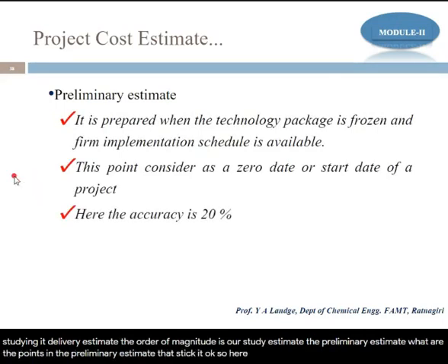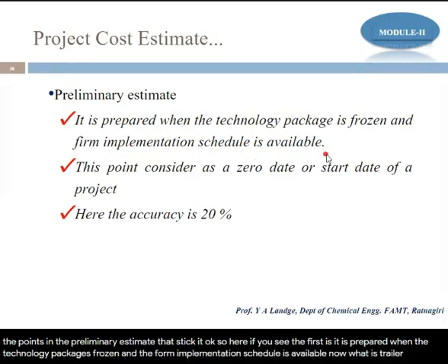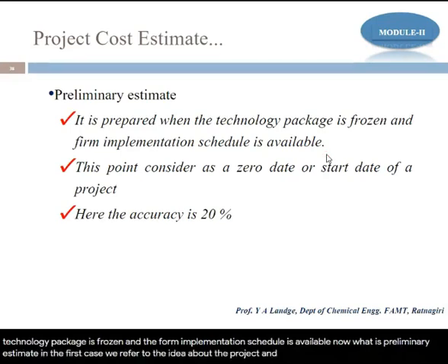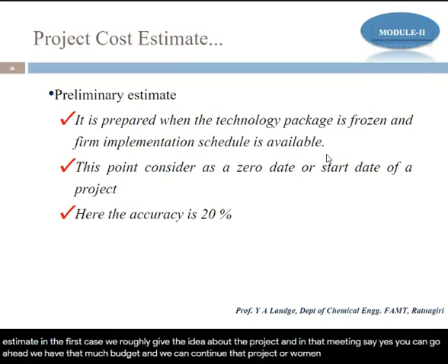So here, if you see, the first is it is prepared when the technology package is frozen and the firm implementation schedule is available. Now, what is preliminary estimate? In the first case, we roughly give the idea about the project, and in that meeting say yes, you can go ahead. We have that much budget and we can continue that project or we make that project, okay.